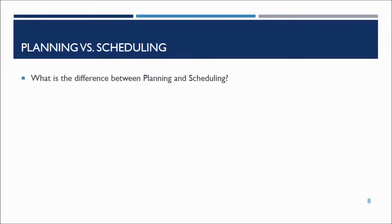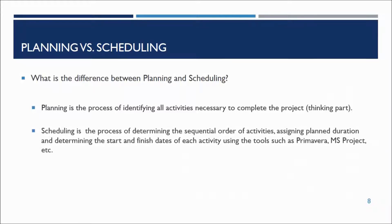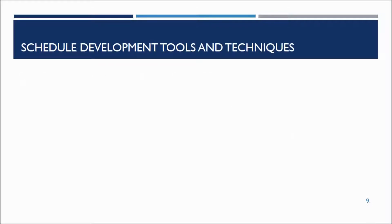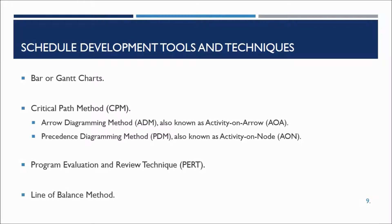What is the difference between planning and scheduling? Planning is the thinking part — the process of identifying all activities necessary to complete the project. Scheduling is the process of determining the sequential order of activities, their duration, and computing dates of each activity using tools such as Primavera or MS Project. Scheduling techniques include bar chart, CPM (activity on arrow and activity on node), program evaluation and review technique, and line of balance.